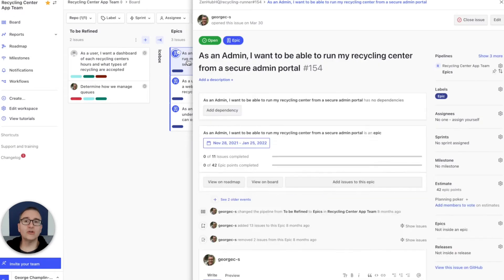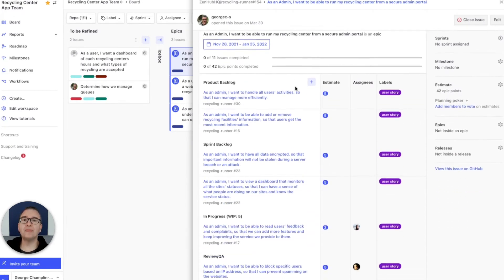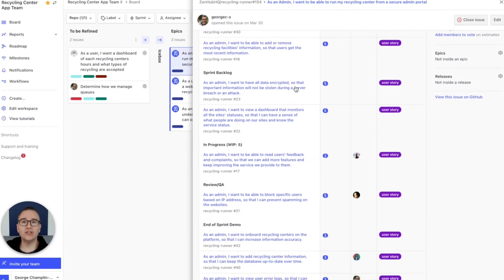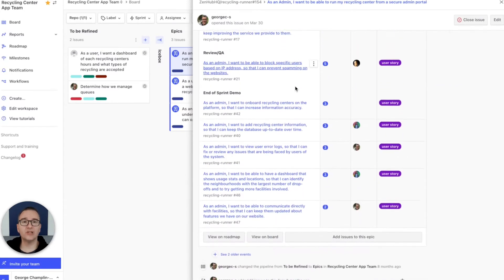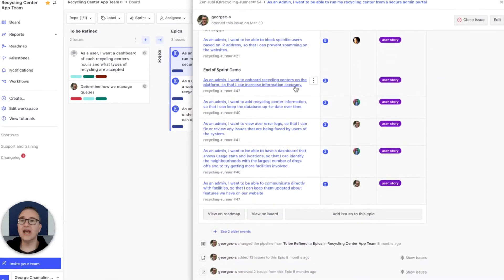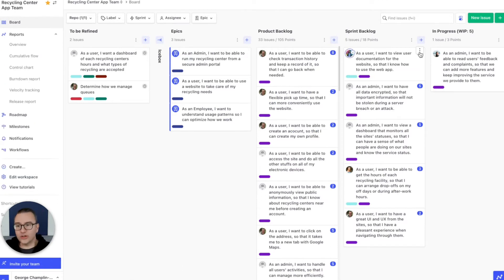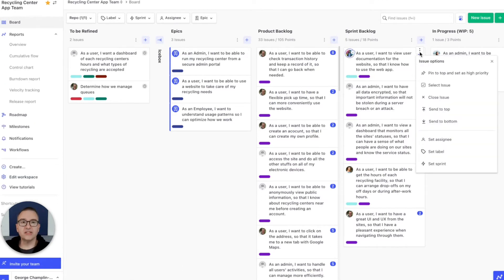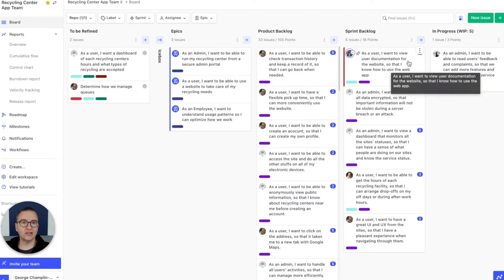Next, you can group issues together into related work called epics. An epic is a parent issue and it lets you track all of the related work and where it is along the flow. To make sure you don't lose track of the most important things, ZenHub adds high priority issues you can pin to the top of a column.